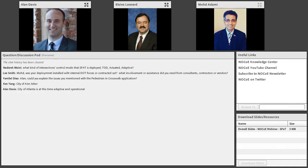So one of the early things we took notes on was from the Utah DOT's deployment, Blaine's deployment. On one of our pool fund studies that we participate in, some of our folks went out to Utah and heard Blaine talk about all the challenges he had with interoperability, and they were using multiple vendors to get it to work. And so we thought we would be smart and say, well, we're just going to use one vendor to do this, and hopefully we'll figure it out with one, and that'll be a lot easier. A lot of the work's already been done.